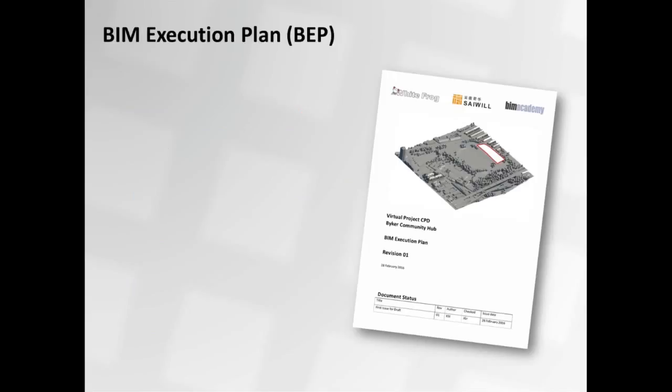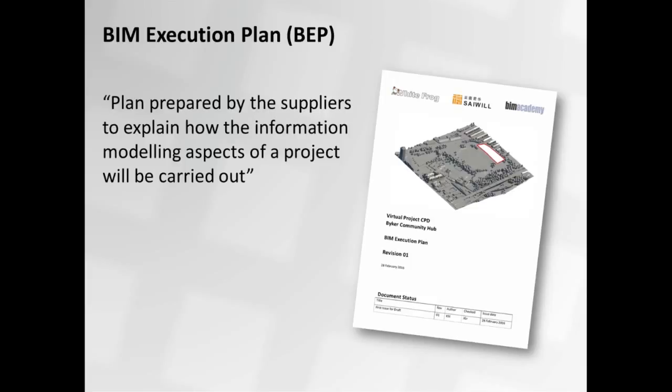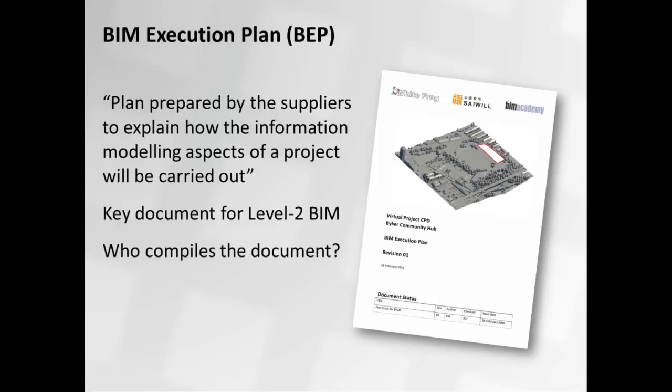What's the idea? The idea is that BIM execution plans are those moments in the workflow of your BIM supported project where a project team responds to an EIR formulated by an owner, formulated by a client. These are information that model the aspects of the process that the team is promising to set up if they get awarded the contract. Okay? It's a key document for level 2 building information modeling, we know that.